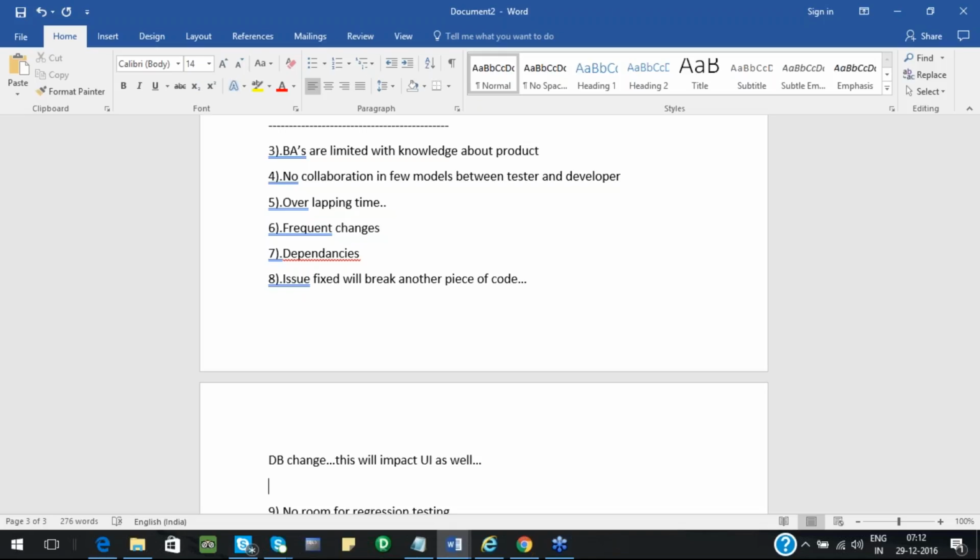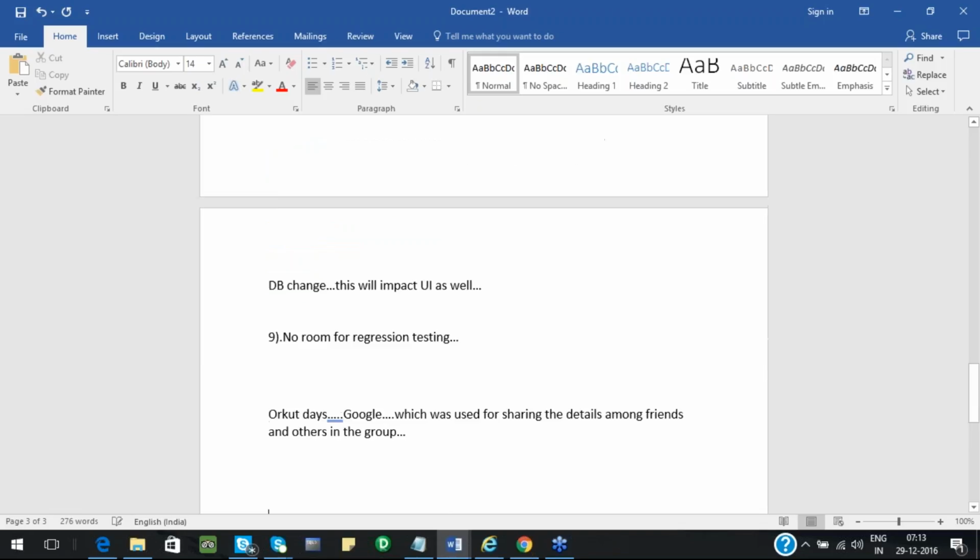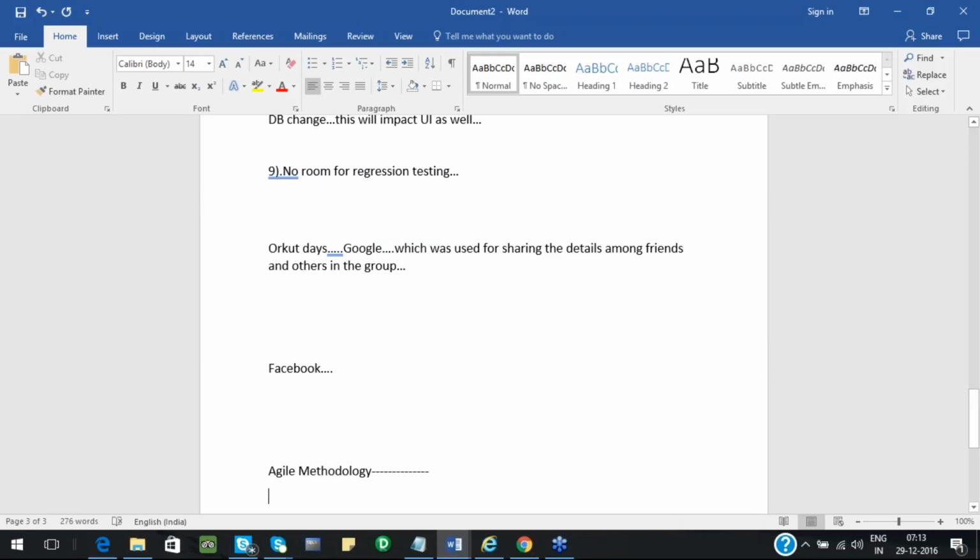Now the UI has been developed, and while developing the DB they found there's an issue with it and they have changed the entire look and feel or the architecture of the database. While doing the third release it is easy to collaborate, but whatever effort was done in release 1 for the UI is wasted, right? So obviously there's a lot of issues. There's some gap in the design, and that collaboration is not happening in this particular model. So that's one issue.